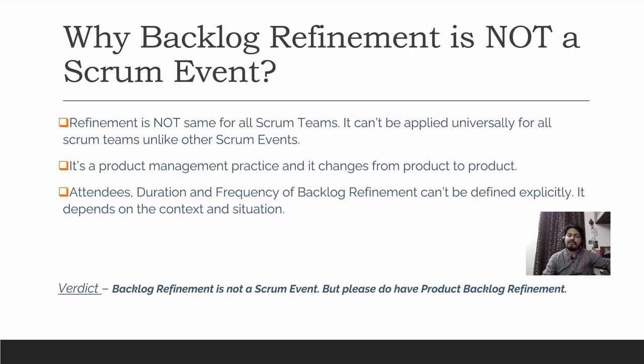But we are not very sure what should be the least amount of capacity that the development team, or rather the Scrum team, should put into refinement. If the product that the team is working on is pretty simple, I will not say simple, because Scrum is applied in a complex world. If the team has the roadmap clear, the product is evolving, and the team is mature, they can do the refinement even during their sprint planning. They don't need a refinement.